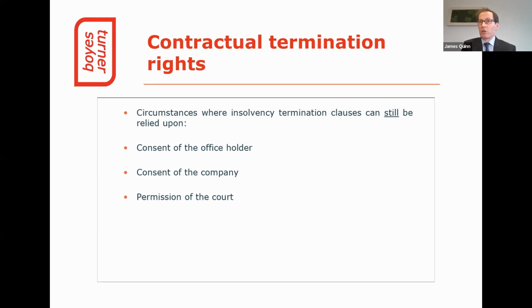It's therefore worth reviewing your contracts to understand if you have a clause permitting termination in the event of insolvency and how this new act may impact upon those contracts. Even though it is possible that the clause may be void, the clauses should still remain within the contract to ensure that they can be relied on if necessary. For example, if an application was made to the court or to the office holder of the company, if they consent to the contract being terminated.